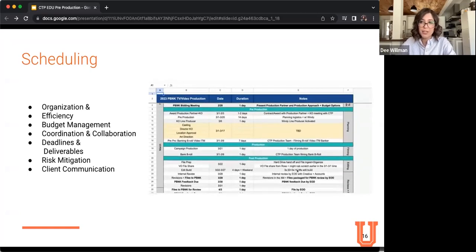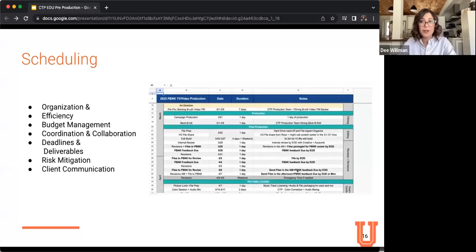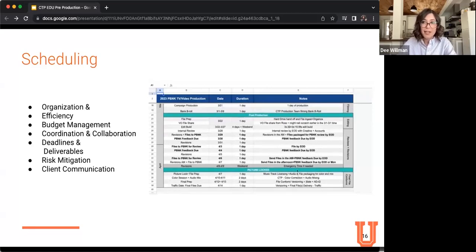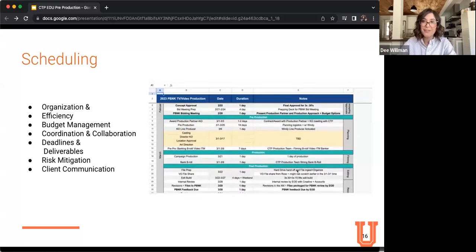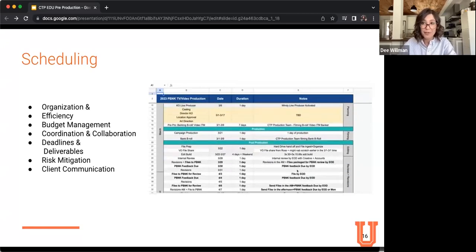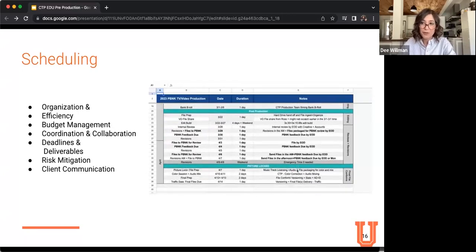This promotes efficiency and reduces the risk of delays and confusion, such as requesting casting specs from your creative team, setting a due date so that you can allow time for your casting agency to collect the best talent with those specs, to have time for your team to review all the options and make selects of those casting options. Then this allows time for your client to review the few selects in a given time frame, which can allow time to inform your talent, their cast, and then schedule your rehearsals.